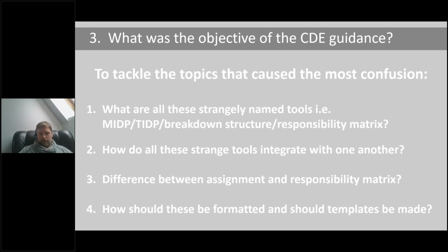The second point is that people and organizations go off and create things independently as tick box exercises, so they've misunderstood how these integrate. They create these TIDPs, MIDPs, and responsibility matrices, but they're all independent and separate and sometimes don't feed into one another. They're just doing it because it's a bullet point in a standard. So the guidance tries to cover the integration of these tools and how some of them are precursors to other tools. What it tries to do in the guidance is explain how this is done traditionally, so how these things that didn't have these standardized names fed into them to start with. So it gives you some context.